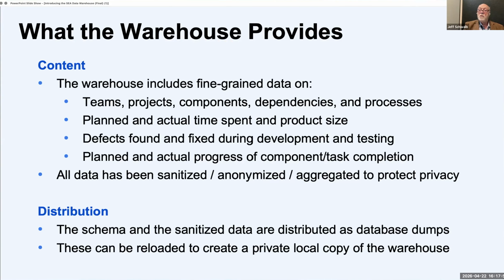And the content is really these 4 aspects. It's project aspects, as we mentioned. It's planned and it's actual. Those are the 2 aspects of data. What do we think based upon historical data and rates and other things, depending on which methodology and the words that you use, but same ideas. And then how much time did I actually spend? How big did it actually turn out to be? How many defects did I think were going to happen? How many did I actually find and discover? What did those cost me? And which ones do I look for and change in terms of things like checklists that I look for those defects? All of those are based upon these kinds of data sets.